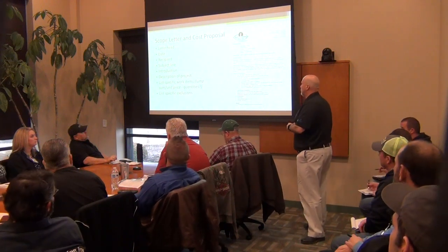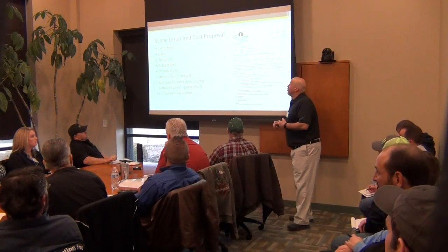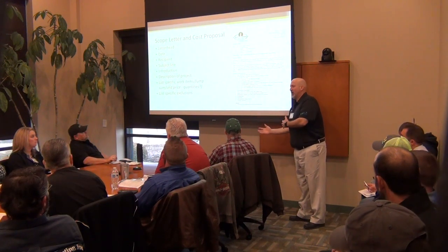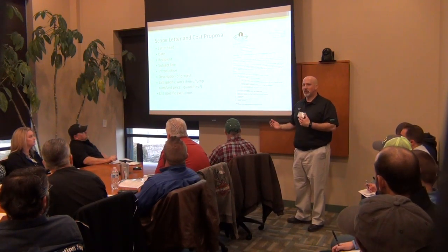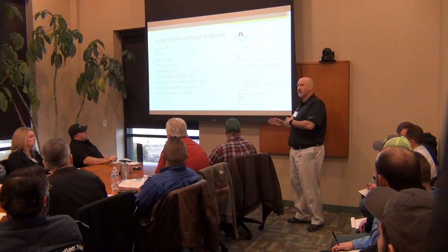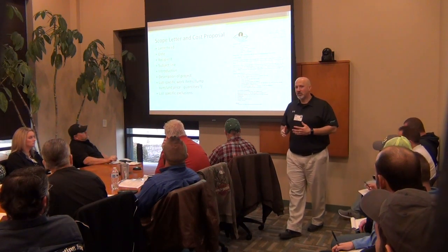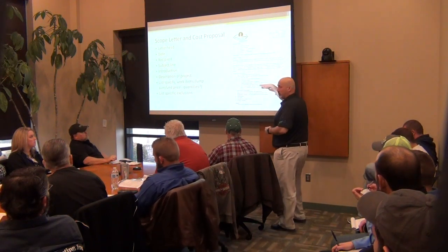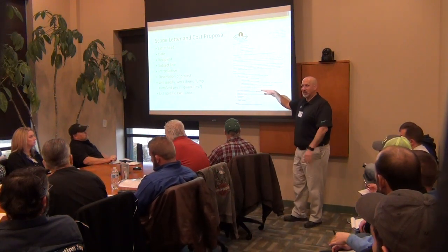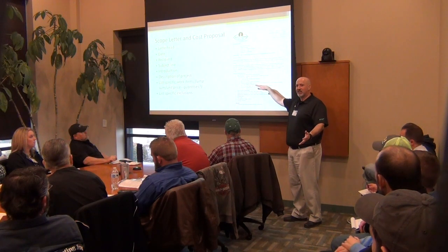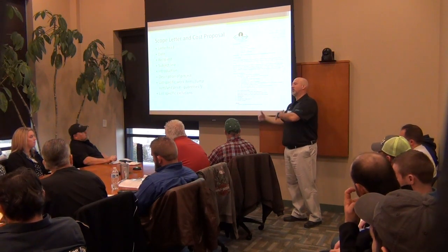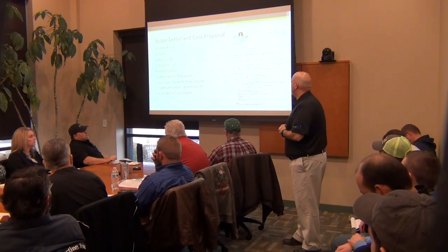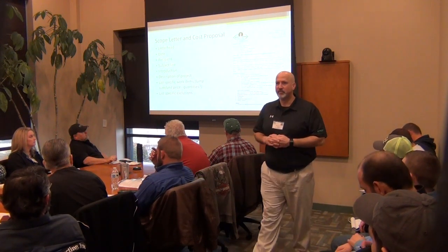People look and say, why do you want your scopes? Well, because if there's something you absolutely can't do, I'm not necessarily not going to give you a project. If there's something that doesn't fit your scope and we want it in that scope, but you're a good contractor, you've got a good scope otherwise and a good price, we'll figure out how to plug that gap, whatever it is you can't do. But I have to know that early, in order to plan ahead in my estimate and cover that gap. So keep to them early.